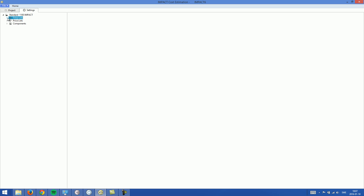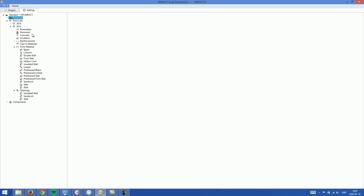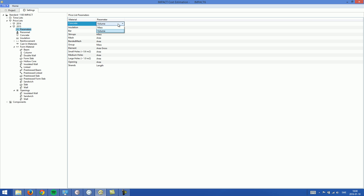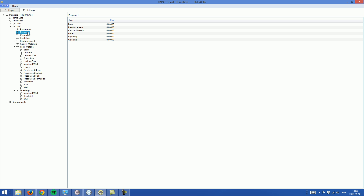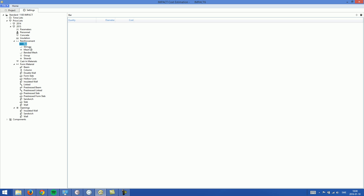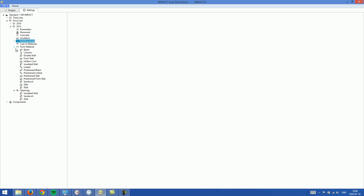Looking at the price list — you can have more than one price list. Starting with the 2015 list: first there are parameters, where you set what kind of parameter to use for each material. For concrete, for example, you can choose mass or volume. Personnel sets the cost for each group — you can set different costs for different types of work. For concrete you can set costs for different recipes, and similarly for insulation, reinforcement with different reinforcement types, and different costs for form and openings.